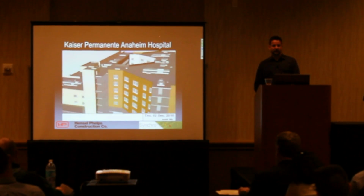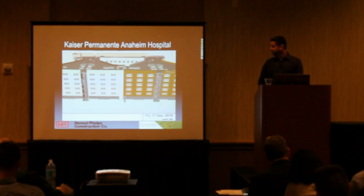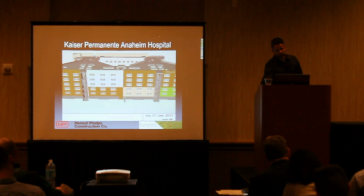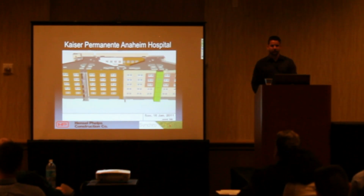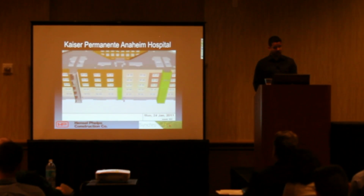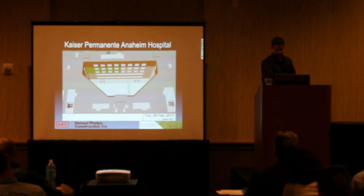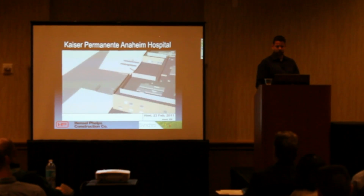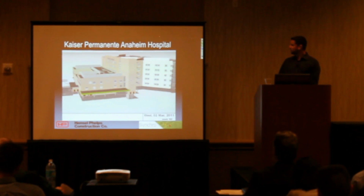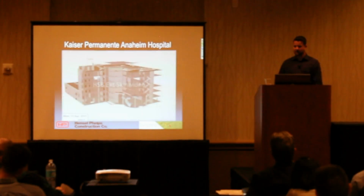The second thing, we were able to find out that we needed a third plastering crew. That the 2 plastering crews that we were originally thinking wasn't going to be enough. We were going to need a third one in that center triangle. So again, this validated our crews, validated our schedule, and once again gave the owner a warm and fuzzy on what our plan was and what we were going to do. So this would be a longer video. So they were so excited about that.